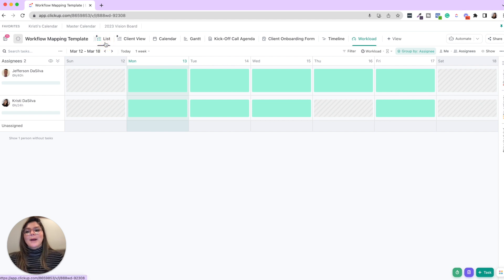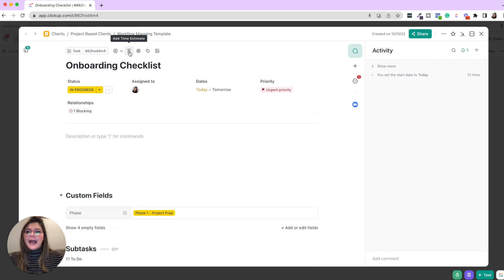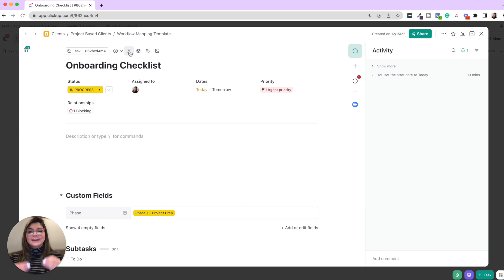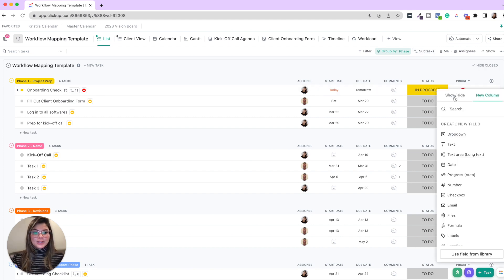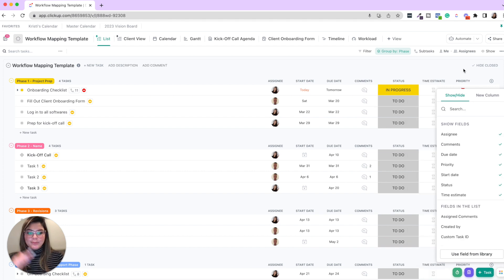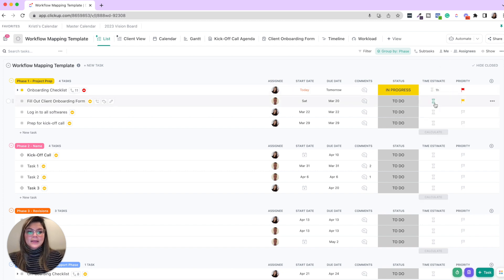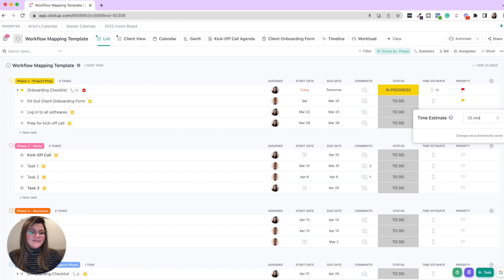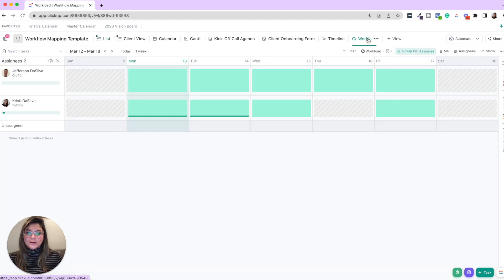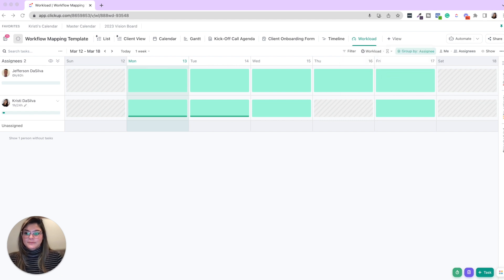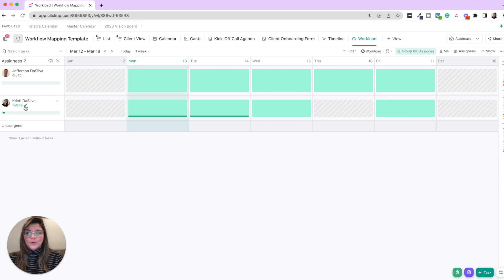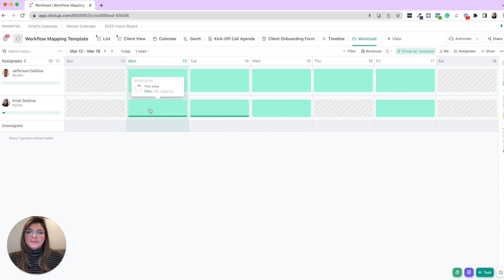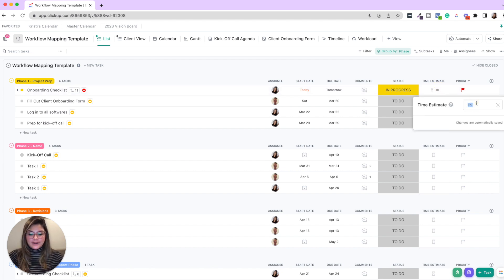What I think is more accurate is using time estimates. So if we go back into the list and we click into a task, you'll see there's this little hourglass here. What this is, is just saying we estimate this task should take X amount of time. Now for simplicity sake, you could also bring this on the outside. So let's say onboarding checklist, we say this will take one hour. Let's say fill out the onboarding form at 25 minutes and so on and so forth. When you add these time estimates to the tasks and you go back to workload, now you're going to see that this is not reading task count, but it's reading hours. So you can set everyone's capacity.